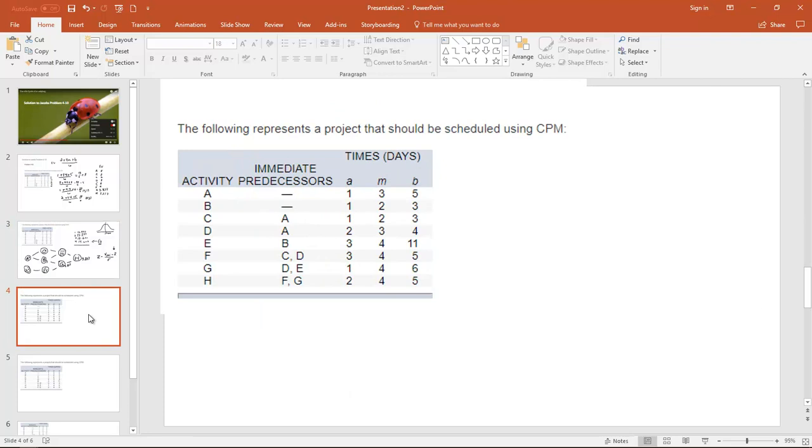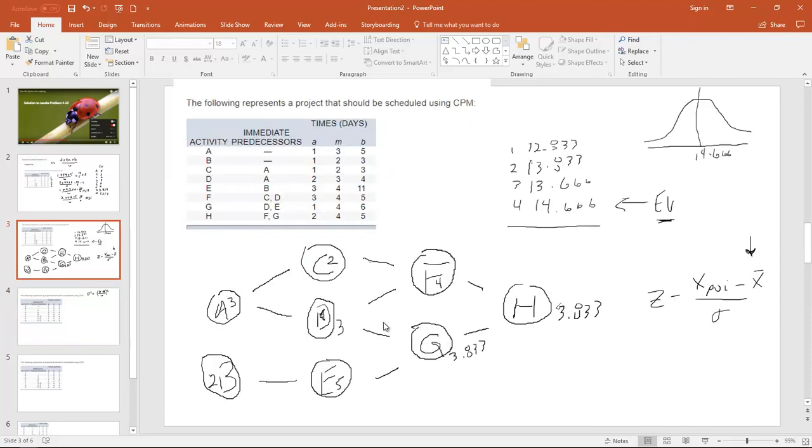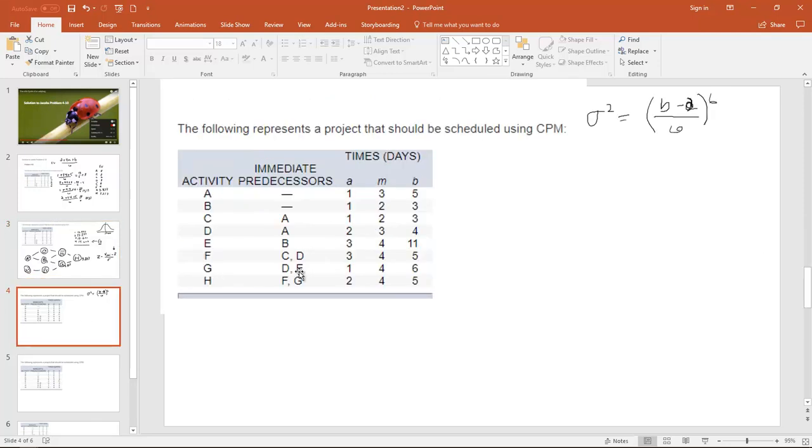Okay. So our equation for variance, which is just sigma squared or standard deviation squared, is what? We're told, and we just have to memorize that, it's the pessimistic view minus the optimistic view. What we're really saying here is how far away is our pessimistic and optimistic? What's the distance there over 6 squared? Okay. And what happens in this problem is we only need to watch the critical path when we calculate these numbers. Now, in the book, you might see that they exhaustively calculate. So we calculated the expected values for each of these, right?